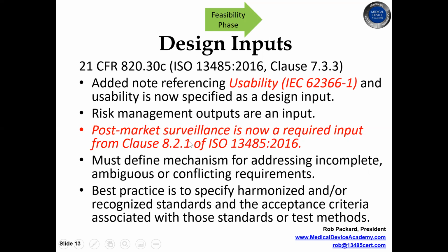Also, you want to be looking at post-market surveillance. Post-market surveillance should also be an input into risk management, or both into risk management and design inputs. And that's something new that's in ISO 1345-2016. So you have to show post-market surveillance was used. You would look at previous versions of your device. You'd look at competitor products. You'd look at any clinical evaluation that you performed before you've even finished the design of your device. Those should be considered as inputs, not something you do after you've finished your design.